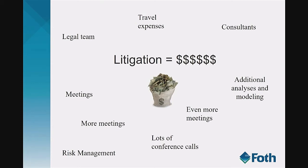So litigation is a very intense time in a project. Front-end litigation in particular, as Brad just described with PolyMet, a lot of money has been invested in the project and they haven't been making any money yet. So by the time litigation occurs on a permitting process, the mine owner is eager to get started. That means the finances, the investors, and the whole technical team are ready, and they still have a mountain to climb with litigation. The risks and schedule delays in litigation are also quite uncertain and add to the stress of it. So the cash flow, as you can see, some of these aspects of the litigation process really draw on funds at that time.